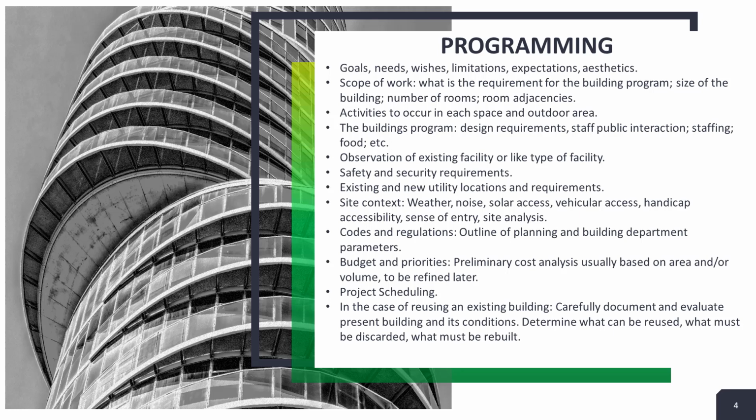This is the time when a common vocabulary for the project is created and preferences and requirements are determined and built into the overall picture before time is invested in design. One of the most important purposes of the program is to reduce the need for later backtracking and redesign. So if you do a thorough program, then you will save yourself a lot of time and headache down the road. We can find out problems that may arise, we can talk to the city or the county and make sure we're meeting their requirements, etc. So programming is very important.